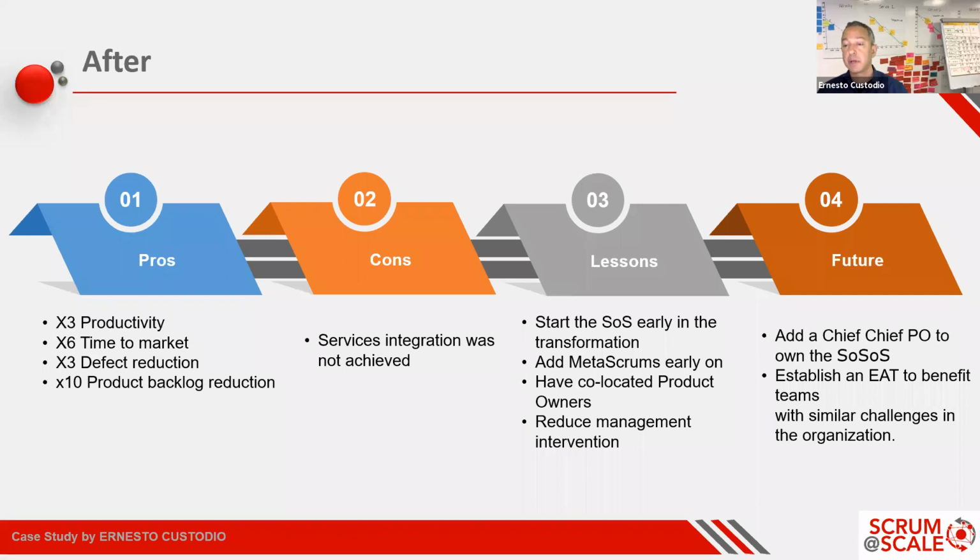The second part is that product backlog refinement is one of the main responsibilities of the product owner. And it is intentionally not an official event in Scrum because it is expected to be an ongoing activity. It is something that is worked on a regular basis by the product owner because that's how important it is. Think about how expensive it is for the team to build the wrong thing. The risk is too high. You need someone who is constantly on top of prioritizing so that they build the right thing, and who is available to answer questions for that thing to be built.